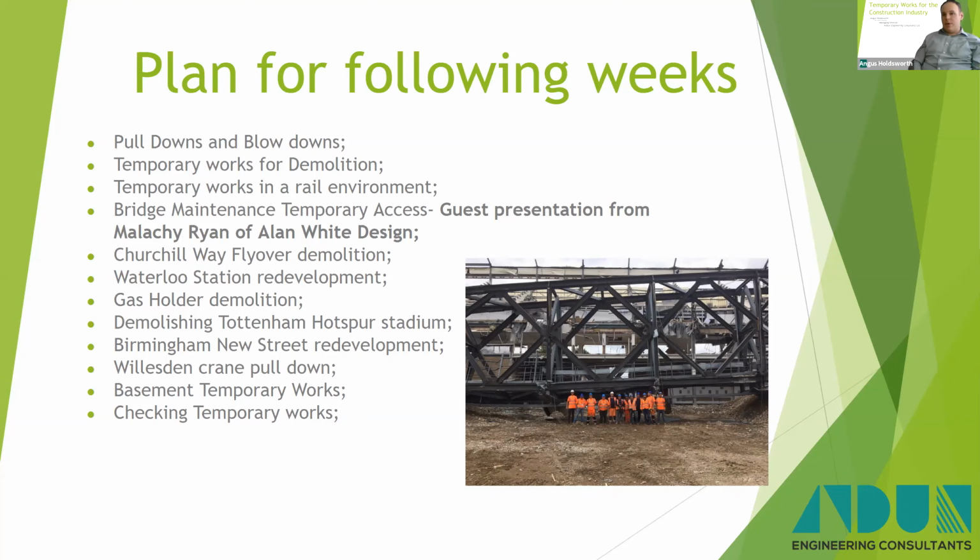The best answer to that is to engage with the temporary works designer at an early stage. We do quite a lot of work at tender stage with clients to come up with solutions and give budget costs for things. That is the best solution. You'll often find that we can come up with ways that will help you win the tender even and save you costs. So the best thing you can do is engage with someone at an early stage and try and work out what temporary works will be required. But I know it's always the same, that the temporary work gets forgotten when people are pricing jobs.